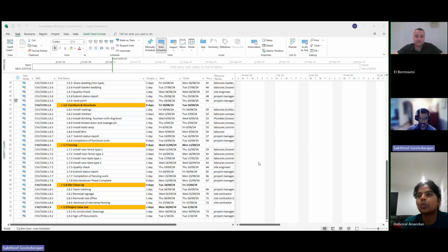That's why I put time allowances on that. This one is after planned, so I added the additional days to cover the additional work. Each phase has a hold point to check inspection, make sure everything is okay, and send the report. That's why I planned my project schedule.